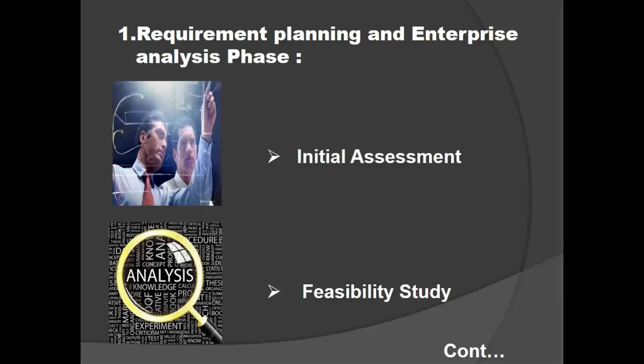Now the client is going to take some time to review and carefully check each word, each line, each sentence, each paragraph, each page of the SRS document. And if he feels that everything is okay, then he will give sign off on that SRS document. So these are the activities that will happen in phase 1. The outcome of phase 1 is preparation of SRS documentation, presentation, and taking sign off.